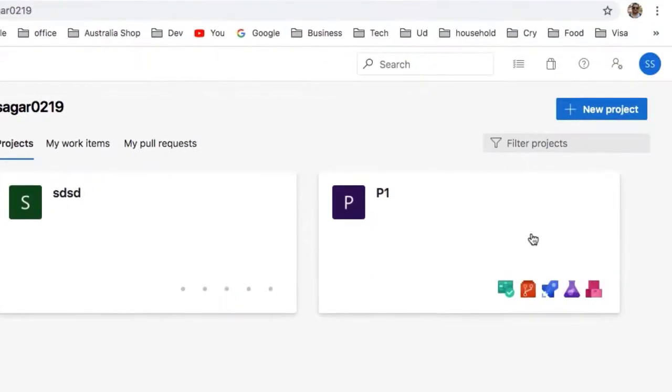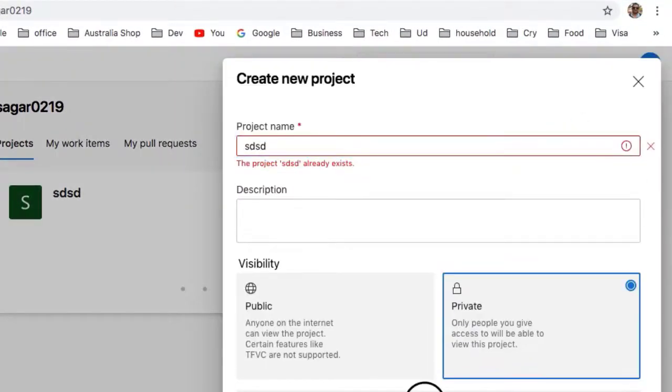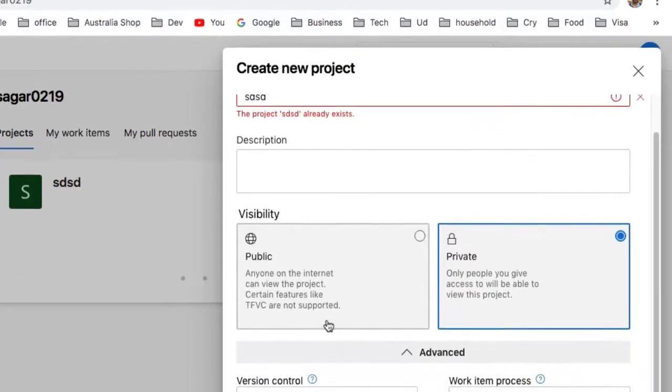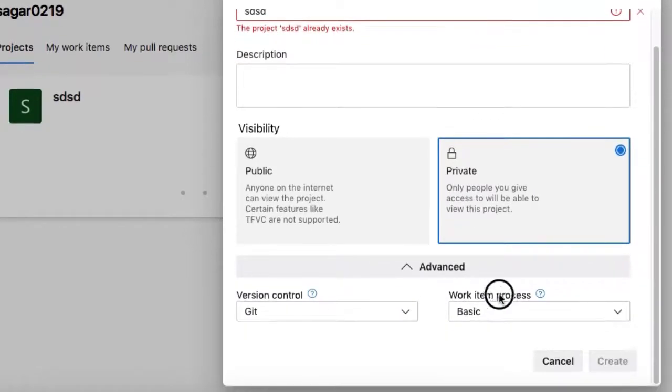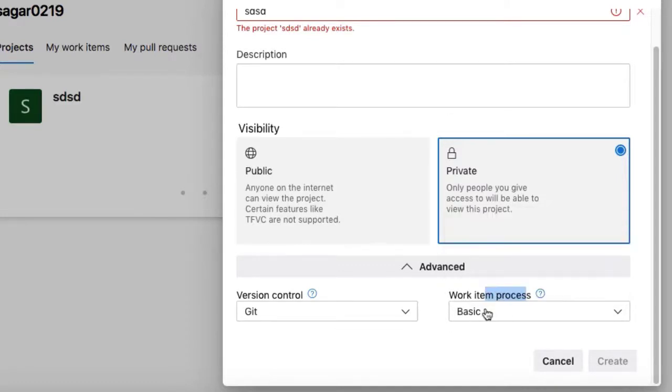Basically, what happens is when you create a project, in the advanced section you can see the work item process. By default it selects Basic, but most of the time we are interested in Scrum. If you select Basic, you will not see those options.